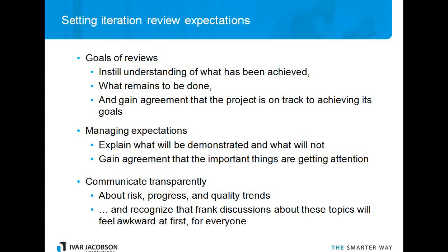Similarly, on an iterative project, you tend to be talking about risks early in the project, and you tend to be tackling very hard problems early in the project, and that's all for good reasons. But everybody on a classic or a traditional approach is used to bad things happening at the end and everything being fine up until you start testing. So it's typical for projects to be reporting green all the way through, and then all of a sudden you start testing or you start doing integration and you start hitting problems. Well, when you start hitting problems early on an iterative project, that's actually a good thing because you've got a lot of time to take care of it.